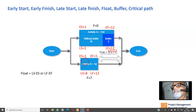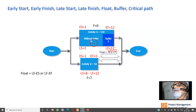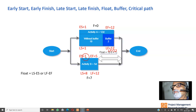There is another parallel activity, Activity B, which has a five-day duration including the buffer. If I start Activity A on day one, it will finish on day 12. At the same time, if I start Activity B on day one, it will be completed on the fifth day.